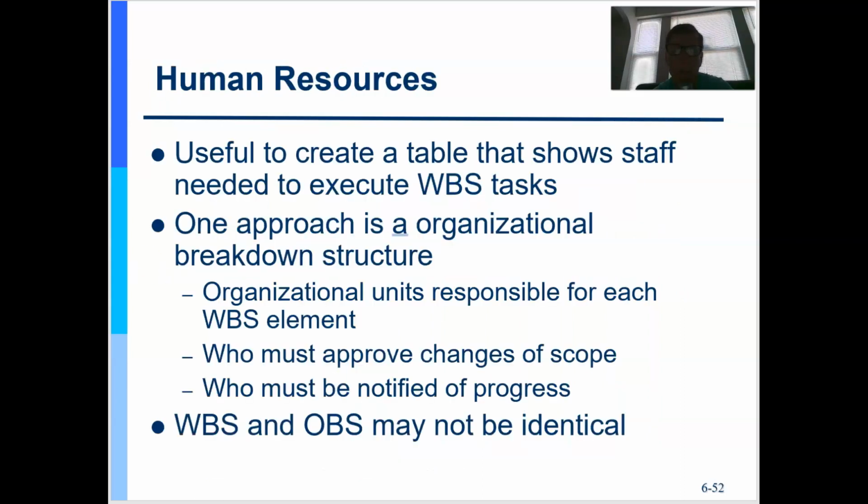And so it will even include human resources, right? Which human resources? So I'm going to use my team to build the WBS, especially the little box owners. We'll call them work package owners. And as I break that down, the WBS, work breakdown structure, ties to an OBS, which is called an organizational breakdown structure. They may not be identical, but they're similar. And that's why I said a WBS looks like an org chart, which would be an organizational breakdown structure.